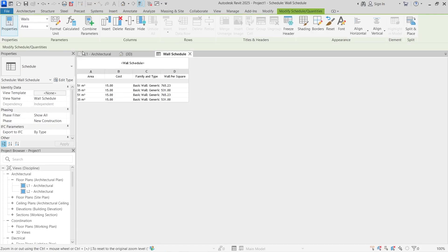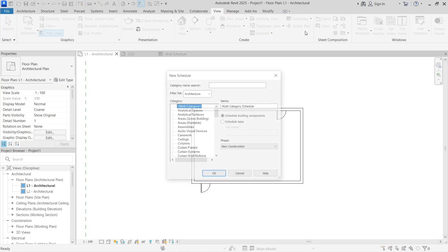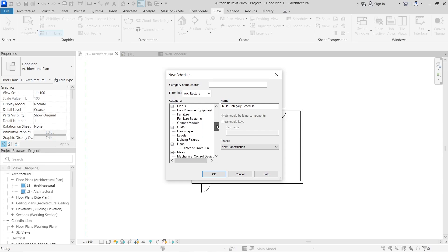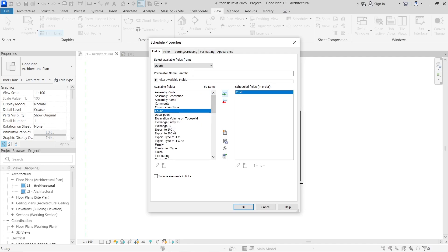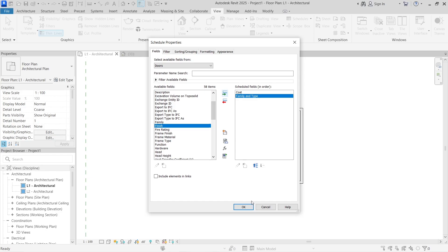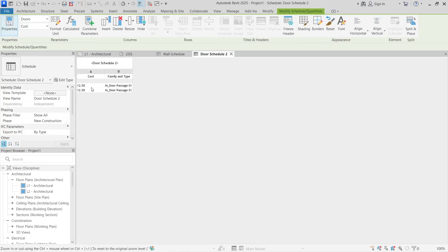You'll still need to create a separate door schedule. Go to View, then Schedules and Quantities, and this time select Door. Add the Cost field and the Family and Type field. Since a door is not measured per square meter like a wall, you'll just use one single unit of door production. Click OK and you'll have a door schedule showing the cost of each door.